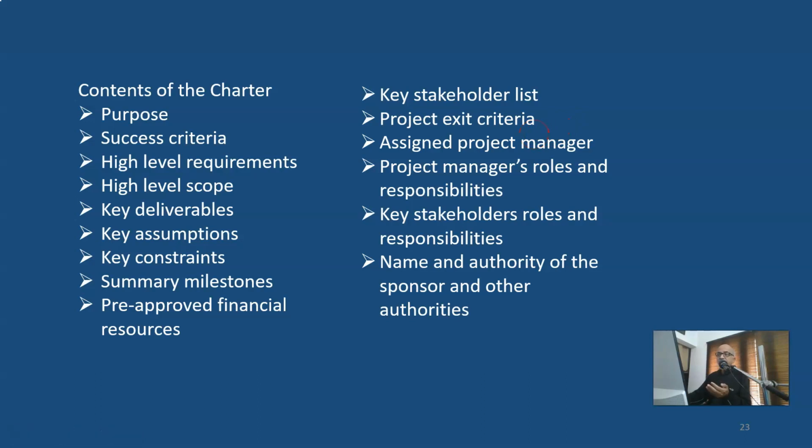Exit can be in two ways. One is after successful completion of the project, or if the project gets aborted in between, what should be the exit criteria. And as we discussed before, a project manager is appointed. The assigned project manager's name, contact details, roles and responsibilities, all these things can be part of the charter.